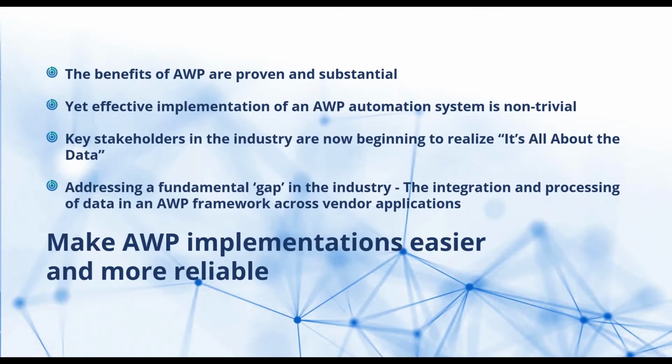So advanced work packaging in and of itself is really a planning methodology. I like to say it's two things. It's getting engineering and procurement in line with a construction and startup sequence. So bringing everyone to the table and coming up with one plan. And then it's work phase planning. It's proactively managing those constraints at the work phase so our workers can be safe and efficient. Now, to achieve that, hypothetically, I can do that with paper and pencil. Now, we work in the 21st century. I would hope that on projects of really any scale, we wouldn't be looking to just paper and pencil, but fundamentally, this is a work planning process.